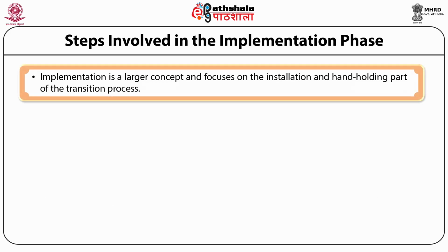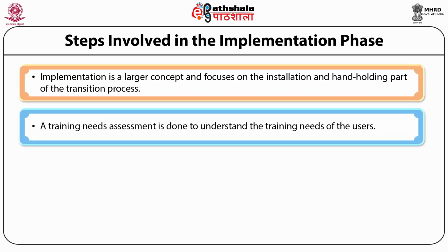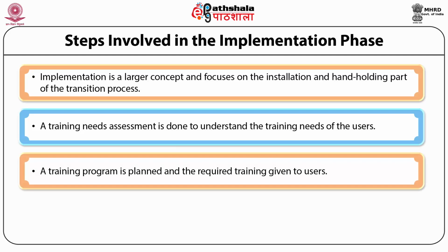So implementation is a wider concept and focuses on installation and the hand-holding part of the transition process. Training needs assessment is done here to understand the training needs of the users. A program is planned and the required training is given. It is an important part of the implementation process and helps in reducing resistance to change, which is the related behavior among the user community.